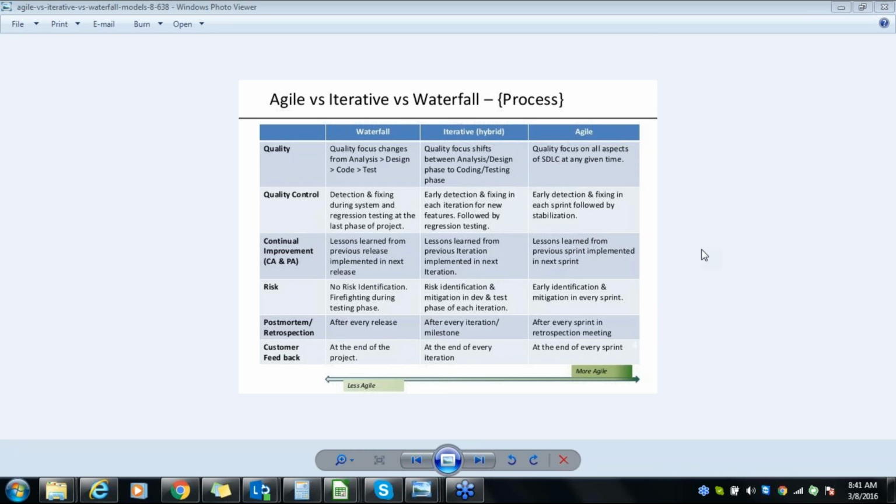But as the industry demands, they have changed agile a little bit, and they came up with this hybrid model where you can do it in bits and pieces. Say something like sprint one is of 20 days. Sprint two will start at the end of the 11th day of sprint one. So they have overlapped the sprints, wherein if any change in the requirement is there, that will be captured in sprint 2.